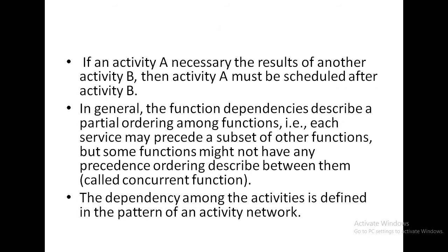Let us consider two activities, activity A and activity B. If activity B depends on the result of activity A, then activity A will be executed first, and after that activity B will be executed.